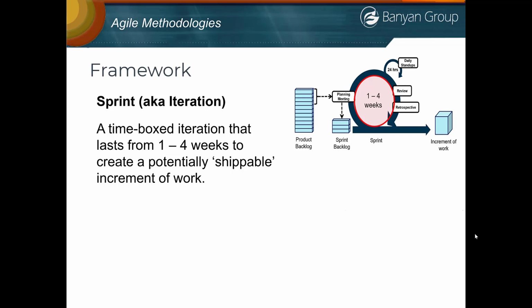And it doesn't change. In the middle of the project, you don't all of a sudden decide you're going to do a 5-week iteration or a 3-week iteration. It usually stays consistent, so the team can develop a cadence, a rhythm, where they can get adjusted to that length of that iteration. It also helps them determine their velocity, something we'll talk about a little bit later.